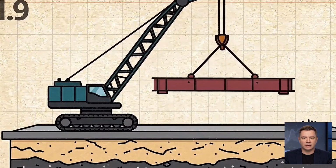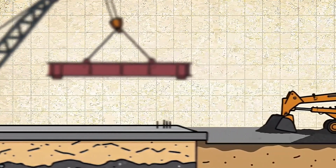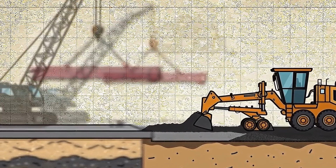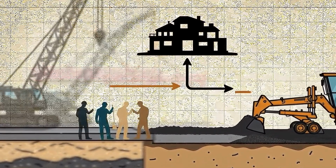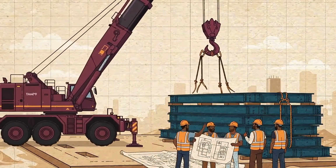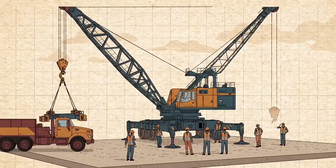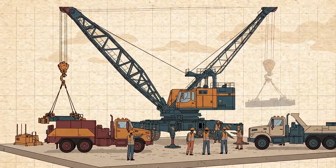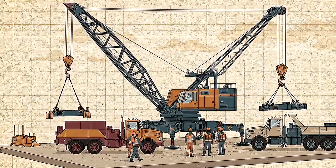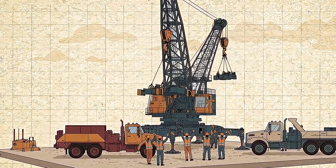A truck needs time. A driver needs time. A route may need permits. Oversize or overweight movements may be restricted by dimension, weight, route, or timing. The crane company's dispatch plan has to match the construction schedule, and if the machine comes apart to travel, the project on the receiving end also has to absorb the time required to turn those delivered pieces back into a working crane. This is what the equipment business calls mobilization, but the word is almost too clean. Mobilization sounds like a line item. Physically, it is the chain of events that makes the crane exist where the customer needs it.